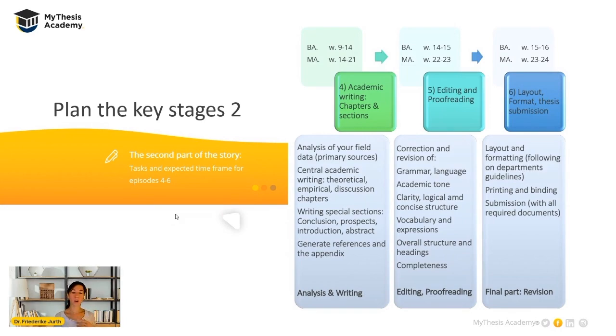If you want to know in advance, before you wrote a single page of your thesis, how you may advance with editing and proofreading, you can also take a page from a former term paper, for example, and do an example, and read it through, correct it, read it through, whatever.